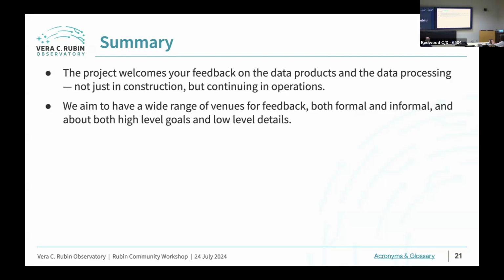stages where we do single frame processing, and while you run the single frame processing pipelines, it emits metrics and plots as it runs. And Colin's verification validation team is going to be monitoring those metrics and plots as it dumps them out. And then at the end of that stage, they will certify it and say, yes, this is fine. And then there's going to be another little pilot run that takes all the backports with the new version of the pipeline and then runs a little percentage through to the end.